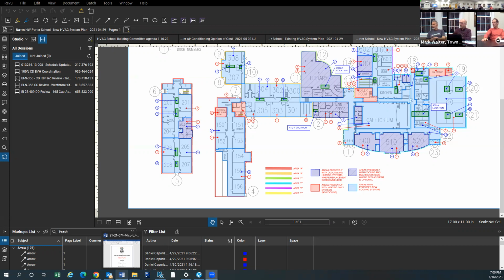No. What we're going to do is go to referendum with, in my mind, the BDH plan, their original specs or estimates from their feasibility study showing what they would recommend. Get that approved. We have to escalate the value, right? Then we ask for X amount in referendum, with an estimate we're comfortable with, including margin. Assuming that gets passed, at that point we could go out to bid for the designer, designing specs that meet it. Yeah, then you would follow through.